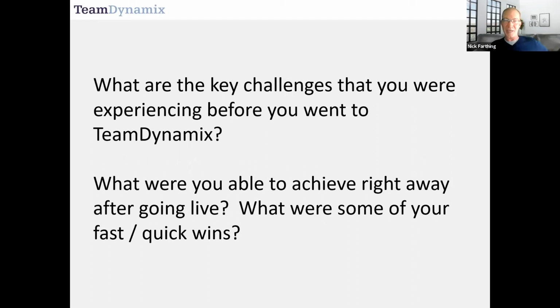Publishing our project status report for the whole portfolio of active and backlog projects, pushing that out to the enterprise, and then allowing them to pull it from the client portal on demand. Again, huge. Exposing all those backlog projects to the business so that they can prioritize the project, not me. I am out of the prioritization business. So we will have true IT governance in 2022.